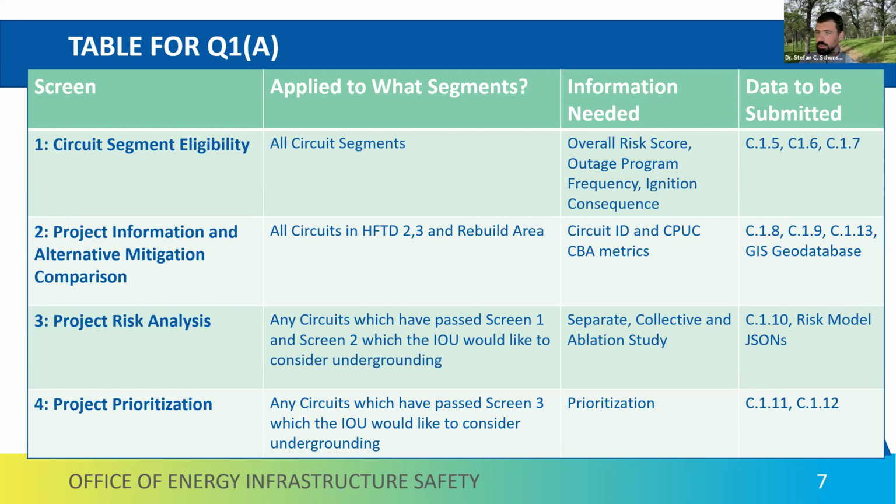Of course, any project under this plan has to go through all the screens, has to be reported in the progress reports. Every screen information, for every project, needs to be updated with the progress reports as models change or as calibrations change due to conditions on the ground. We require some number of screens, of course, to go through the entire framework to demonstrate that the framework is being applied appropriately. But your sample is going to be biased.